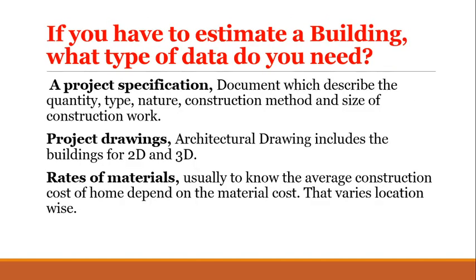If you have to estimate a building, what type of data do you need? A project specification document which describes the quantity, type, nature, construction method and size of construction work. Project drawings — architectural drawings include the building in 2D and 3D. Rates of materials — the average construction cost of a home depends on material cost, which varies location-wise.